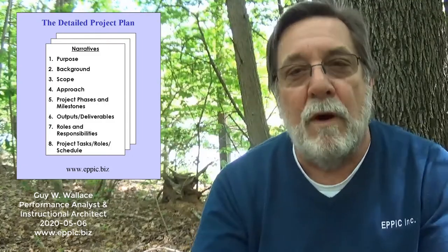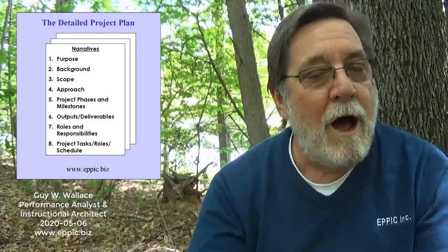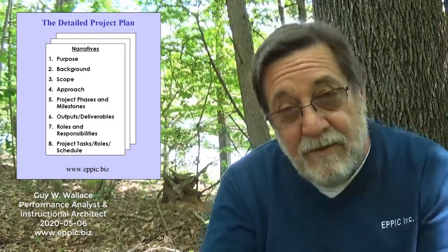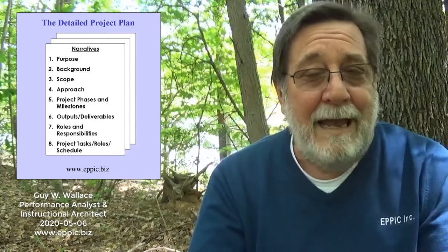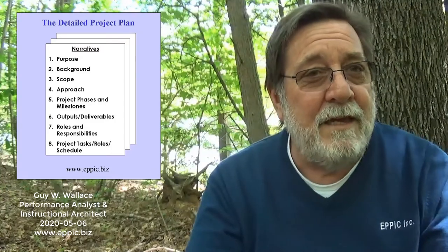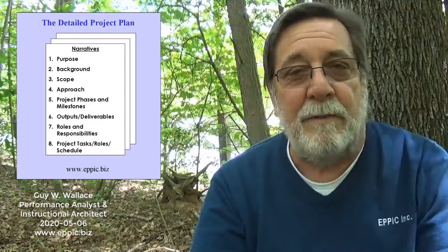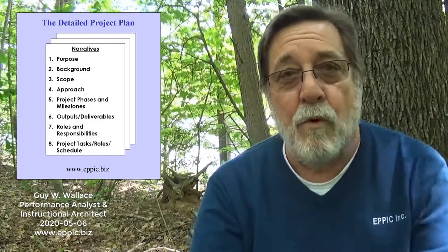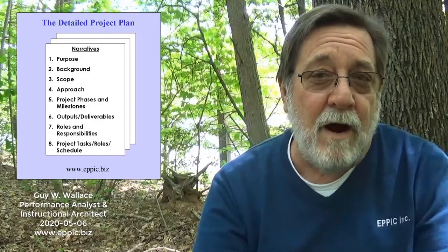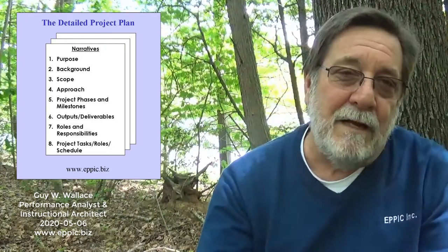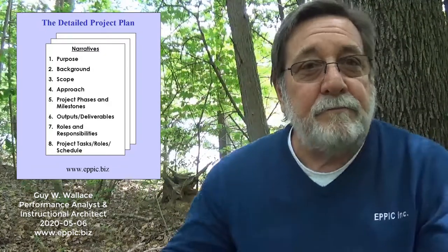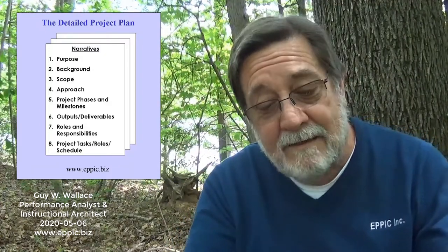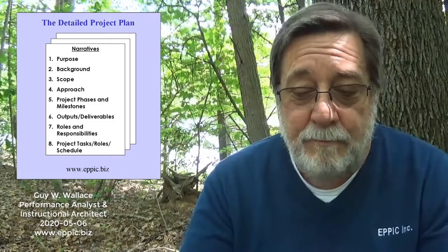Here's what we're going to go do, when we're going to go do it, who's going to do it, how much time we're estimating it's going to take. Either that seems like a reasonable estimate, a guess, or not. And I guess things in terms of the number of days it took. So sometimes it might be 0.5 days, or I'd go down to 0.25 days, which is the equivalent of 2 hours. So I was estimating in a minimum of 2 hour segments, if you will, but at a detailed task level. So let me talk about the project plan right now.